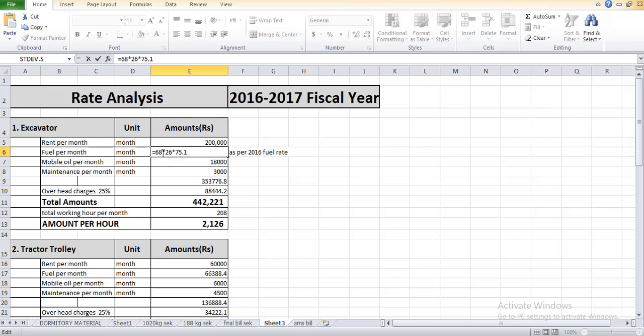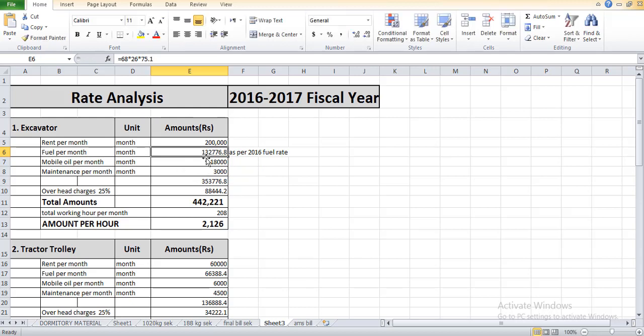68 liters is the total consumption of excavator in eight hours, so we calculate 68 times 26 days times the cost of one liter of diesel which is 75.1 according to 2016-17. The total fuel cost becomes 132,776.8 rupees.